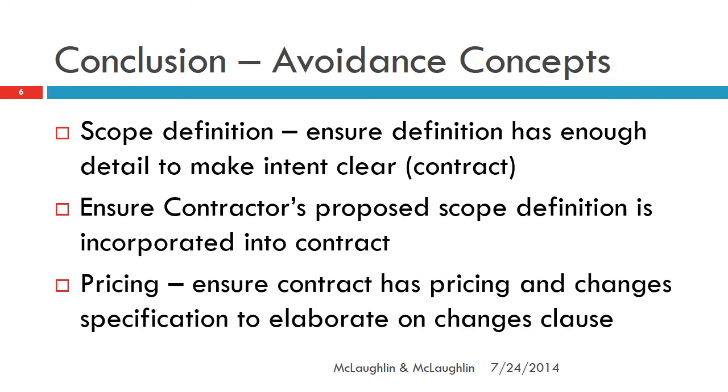The third point is relative to pricing, and that is to make sure that the contract has enough pricing and, frankly, some sort of change specification so that you have more than simply the changes clause in the front of the contract. We need more detail. What sort of pricing, how do we deal with the change specification? Could deal with pricing, could deal with methods of establishing the pricing, and should include how to deal with time. What sort of time analysis should be performed? What's the methodology? What are the conclusions? What's pricing? Do we get overheads? What are they? And so forth. And that should be addressed as well.